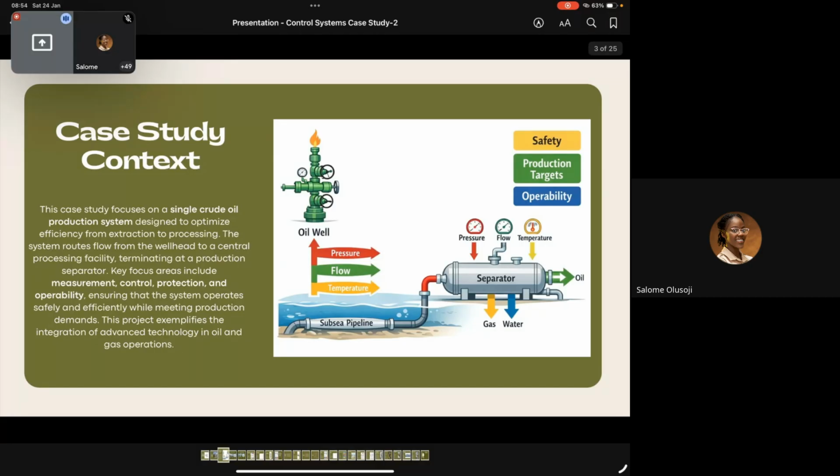Your detailed design, you assign it to be 3 months. Your construction, 4 months. Your pre-commissioning 1 month, commissioning 1 month, and then RFSU 1 month, right? So you can use that now to scale it based on that percentage.